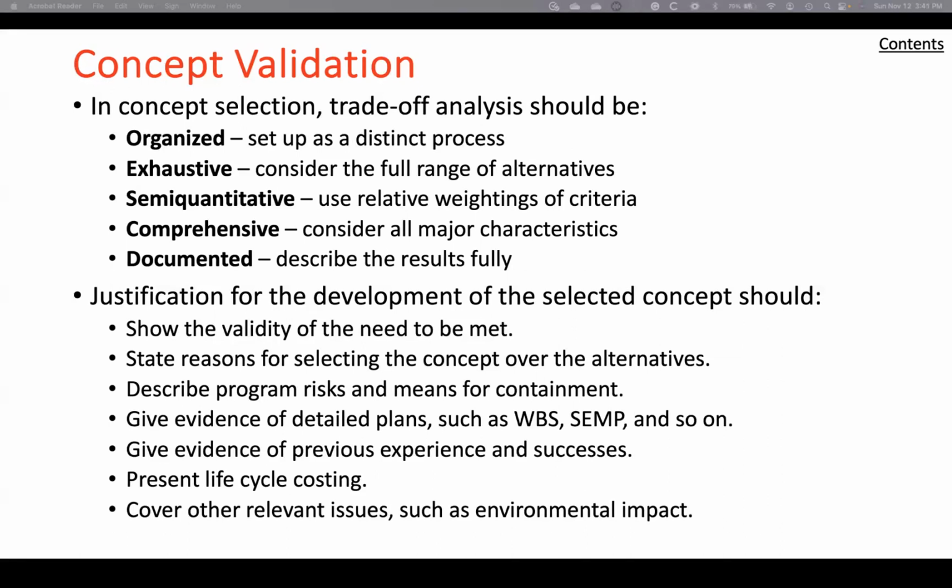identified deficiencies. In the concept definition phase, the construction of system effectiveness models by the system developer depends on whether or not the models used in the previous phases are available, as in the case where the developer is also the customer. In that case, the models can be readily extended to conform to the selected system concept for the validation process. If not, the construction of the model becomes part of the concept definition task. For this and other reasons, the preparation for the competitive effort often begins months and sometimes years before the start of the formal competition.